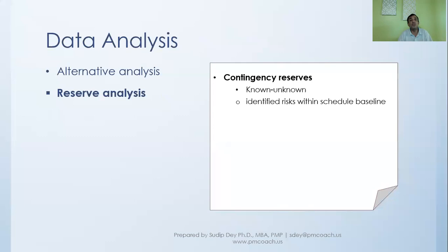So what we'll do is we will take this risk into consideration and apply some extra days so that we take into consideration this risk, and we can include that in the schedule baseline. So the way we do it, we might say in percentage, or we might say fixed work periods, or by some kind of analysis. So for example, we have said that this will take 15 days. We have estimated that.